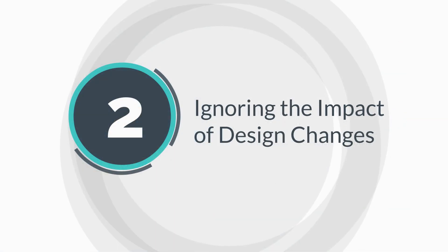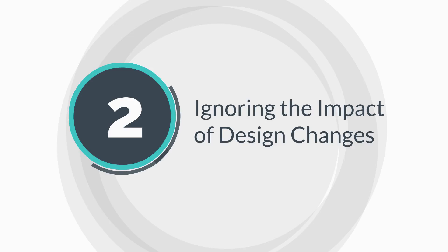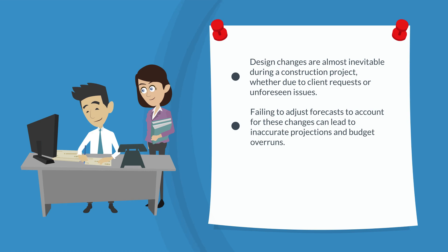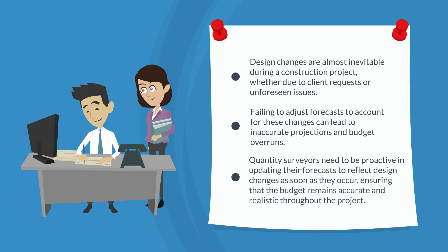Mistake two: ignoring the impact of design changes. Design changes are almost inevitable during a construction project, whether due to client requests or unforeseen issues. However, these changes can have a significant impact on cost. Failing to adjust the forecast to account for these changes can lead to inaccurate projections and budget overruns. Quantity surveyors need to be proactive in updating their forecast to reflect design changes as soon as they occur, ensuring that the budget remains accurate and realistic throughout the project.